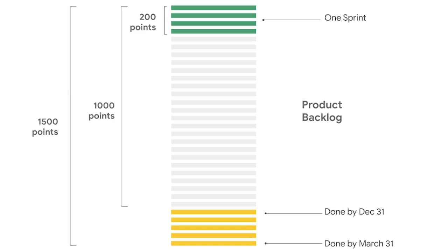What if it's July and the team wants to know what will be available by January 1st? No problem, that's 5 months away. Just go down the backlog from the top and draw a line when you hit 1,000 points. That's a pretty confident estimate based on the past performance of the team. Pretty powerful, right? If you want to pull in the dates, you can use this information to decide to add people to the team and increase velocity, rearrange the priorities, or make other key project decisions.